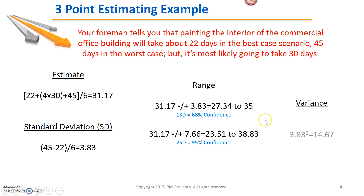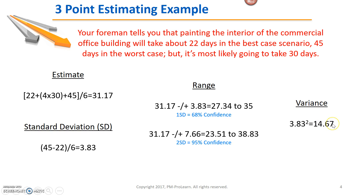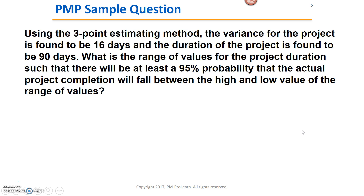The variance is determined by taking the standard deviation and squaring it, which gives 14.67. Alternatively, if the question gave you the variance, as ours did, you take the square root of that to get back to the standard deviation. That's how all those formulas work.